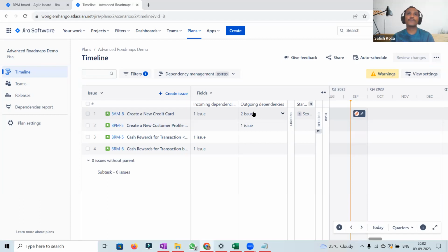Recently, we observed that for one of the issues, the team was not prioritizing it because they felt it was easy to complete, maybe in sprint 4, for example. But the moment we took a look, they had 5 outgoing dependencies, which means 3 different teams were getting blocked because this team was not prioritizing that specific issue until a specific point in time.